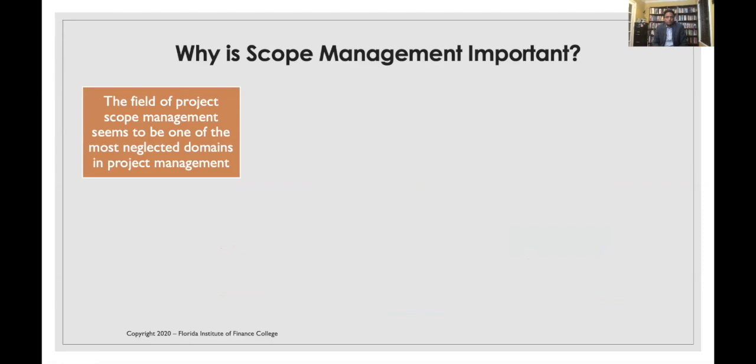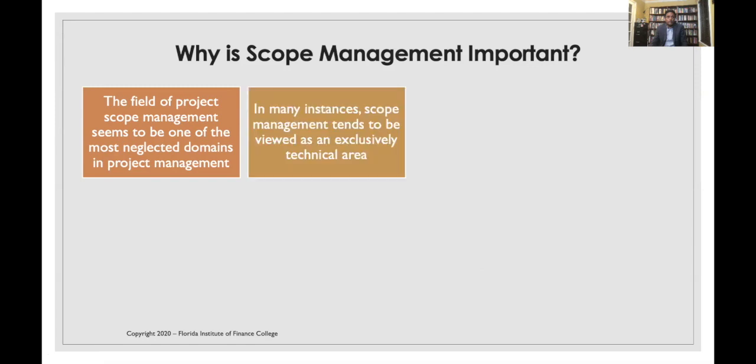If you are an executive, or if you have worked on projects, you probably know that once the budget is approved, people just jump to estimate the cost and the schedule and move on, saying, well, we'll figure it out as we move on. That's not true. That's why defining the scope is often the step that is missed, and it's the one that is going to cost us dearly down the road. That's why it's important.